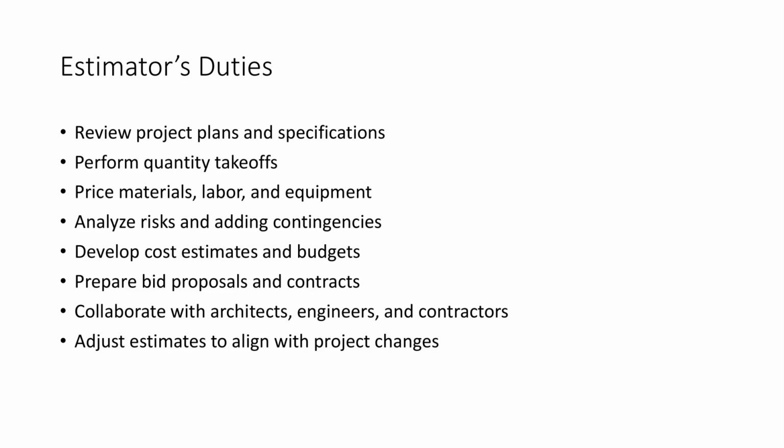Some of the duties of an estimator: at the start of every project, you review plans and specifications carefully, and then you start with quantity takeoffs from construction drawings. Then you assign prices to those quantities, the price of material, labor, equipment. You analyze risks and uncertainties. You add contingencies for those. And then you develop your cost estimate and hand it off to the project manager.